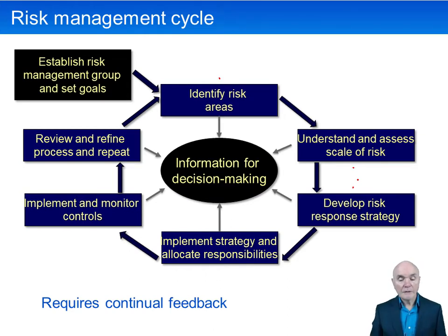And what we then have to do is to implement that strategy and allocate responsibilities. There's no point going through all of this preparatory work and identifying risks, assessing risks, thinking, well, we should do that, if that's not actually done. And the way you do it really is to give a personal responsibility to someone and to give them dates and deadlines and so on that they have to report back to say what's been done with that risk and so on.